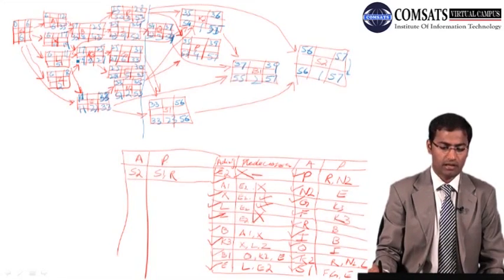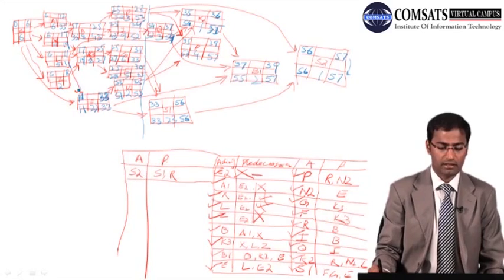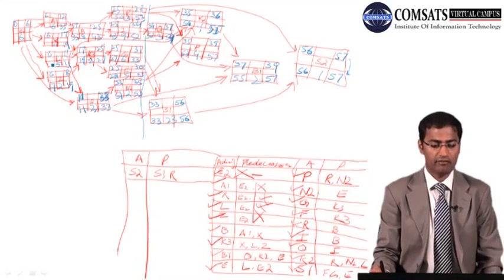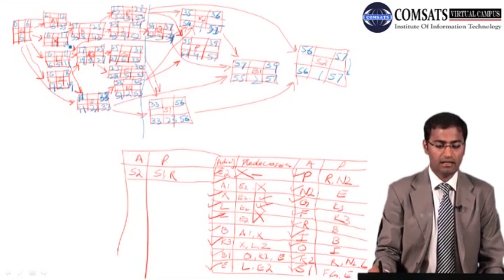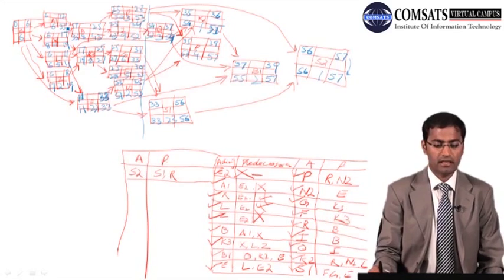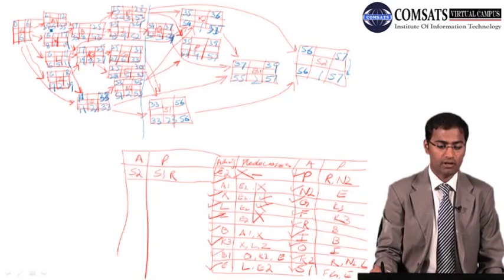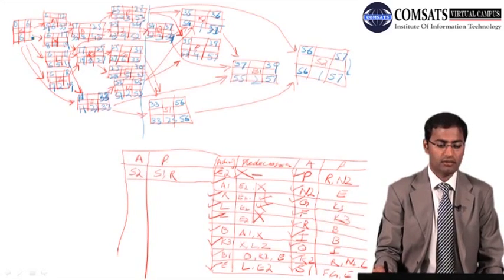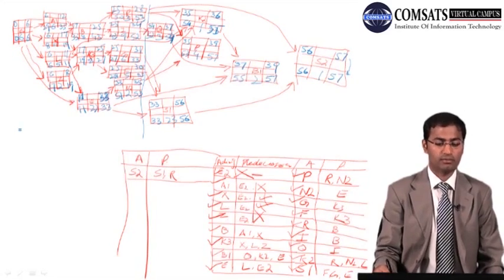That is dependent on, so we will take 19 or 11. Okay, we will take that 11. So that is dependent on 19 minus 2, 17, 11 minus 5 is 6, 19 minus 11 is 8, 35 minus 6 is 29, and hence we will take the smaller one among 29, 8, 6, and so we take 6, and this is 0.